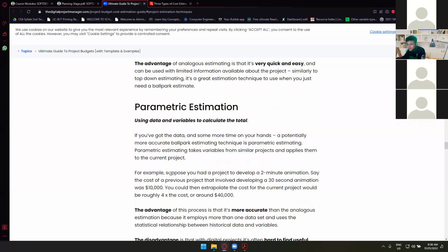For example, suppose you had a project to develop a 2-minute animation, and the cost of a previous project that involved developing a 30-second animation was $10,000. Now, this company asked you to do a 2-minute animation. From your previous project, you have calculated that the 30-second animation is worth 10,000. So just multiply this by 4 since you need 2 minutes. 10,000 times 4 will give you a rough estimation of 40,000 for that 2-minute animation.